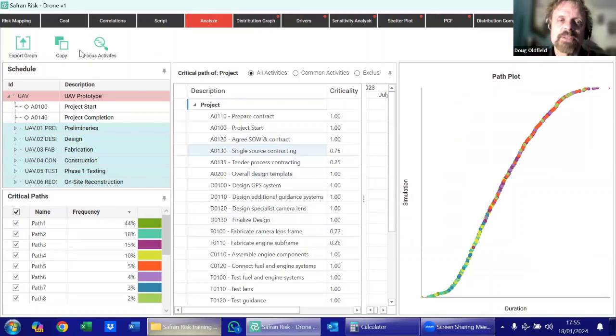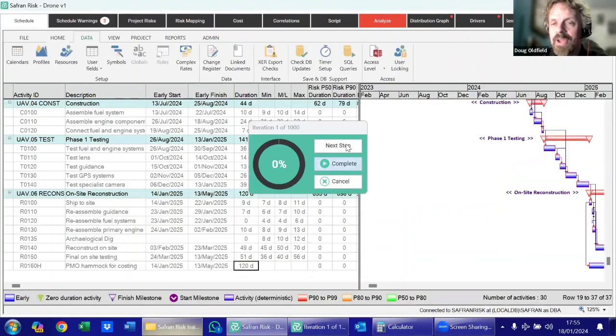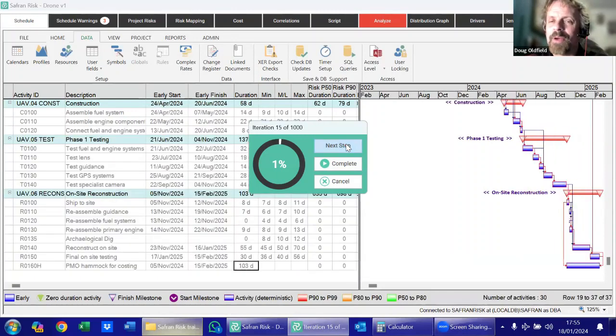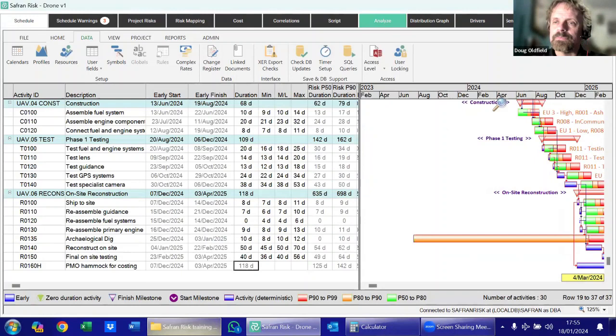Actually, as soon as we start to run a simulation, we have a schedule that starts to move around. We have risks and opportunities dropping in and off. We might have different activities coming on, and when we start to run a simulation, we end up not with just one critical path, but sometimes with a whole series of critical paths.